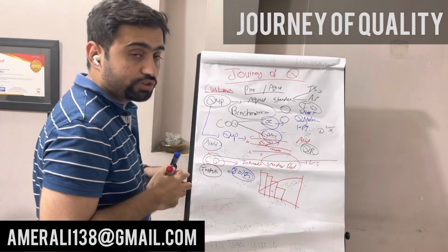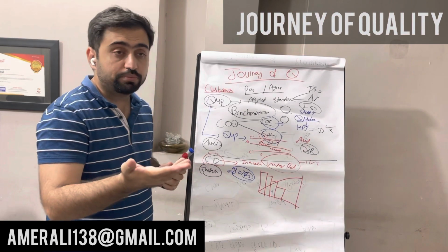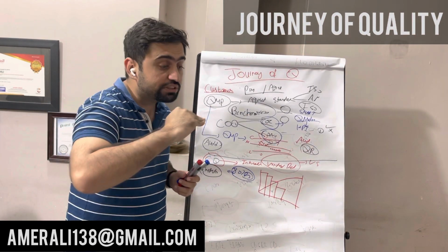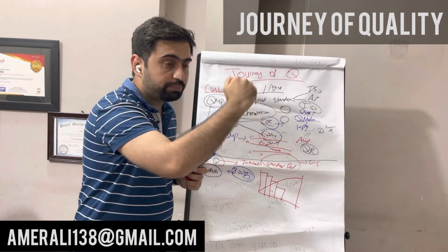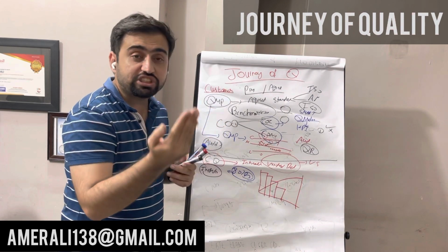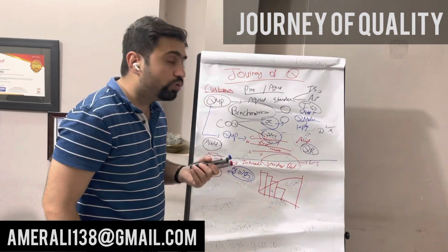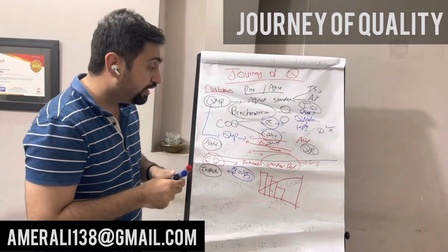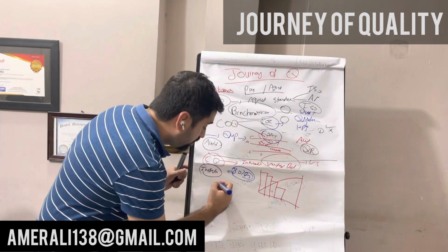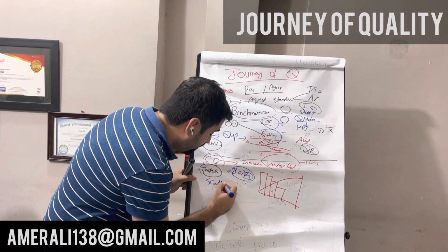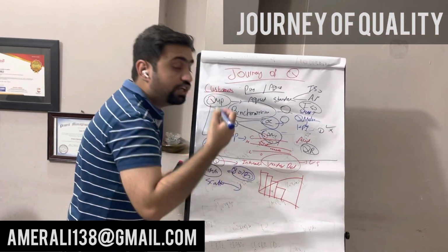Then you also use a histogram to show frequency distribution. You use a flow chart to show the sequence of the steps, step 1, step 2. You use check sheets, like counting down the number of how many defects there are. Then you also use a scatter diagram, the correlation diagram. Whenever you hear the word scatter, there is always a correlation diagram.